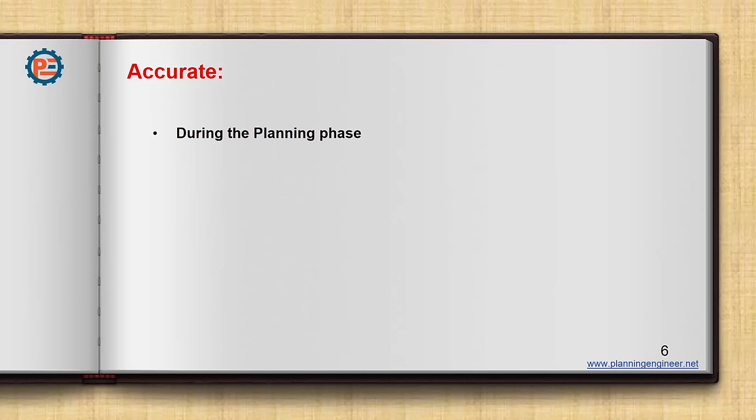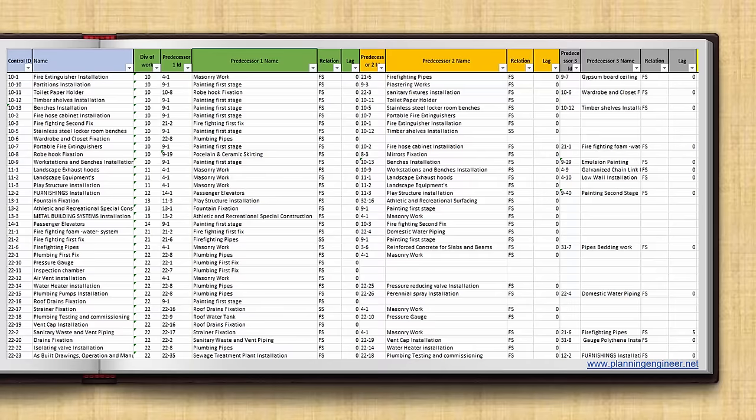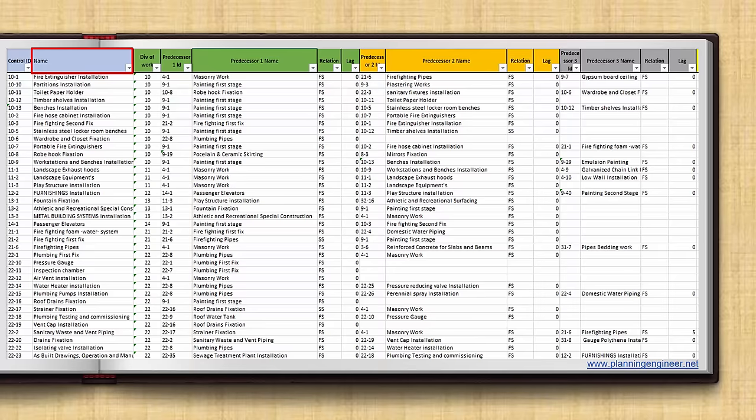What I mean by accurate? You need to be accurate while you are doing your planning tasks, in two stages. First is during the planning phase. There is a big gap between planning engineers and site teams. The site teams have no time to check thousands of relationships and activities in your schedule. You as a professional planning engineer should make their life much easier. Using our concept relationship bank, you can share with them a very simple Excel sheet showing the activities and the predecessors.